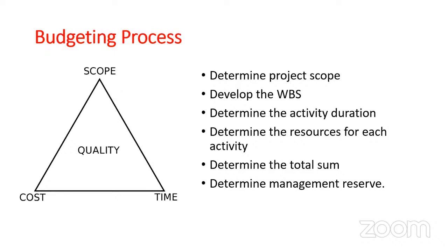But more of the management reserve, you see 5%, you see 10%, you have 20%, 25%, 50%, dependent on the risk factors associated with the project. So the higher the risk associated with the project, the higher the management reserve for that project. Okay, and the lesser the risk factors, the lesser the management reserve for that project.